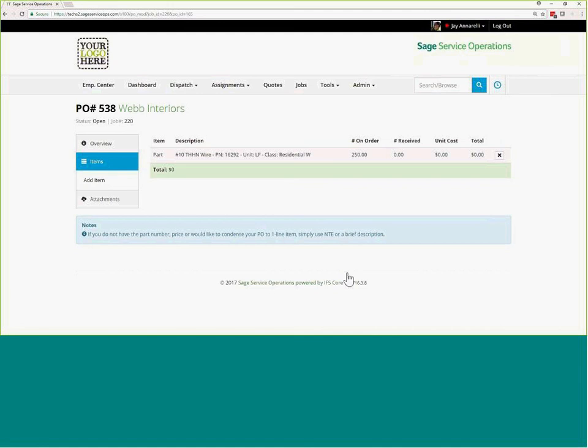Well, I assume that you don't necessarily have to bill the time to the customer. Here we're simply, at a minimum, on a job, not a work order, on a job, capturing the time for cost purposes. So, hey, we spent 4 hours of effort doing the rework. But that doesn't necessarily mean you're going to go in and bill out that extra time. That would be an activity. If you chose to bill that extra time, you'd have to go into 100 Contractor and create the bill. Now, that's a little different if we're talking about a work order, but I assume we're talking about jobs here.